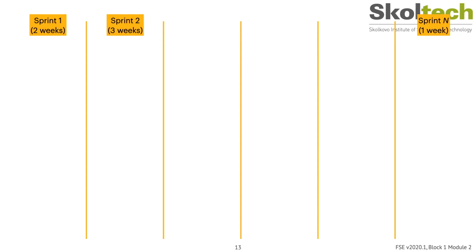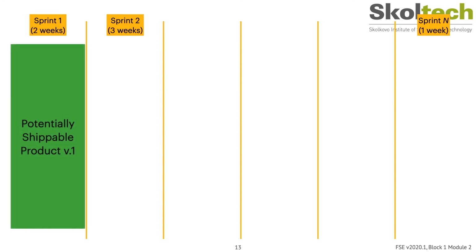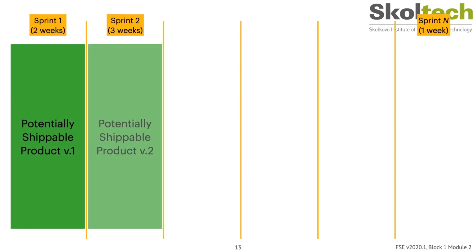strategy. A Scrum project creates a series of time-boxed incremental iterations, which are usually called sprints. In traditional Scrum, a sprint is 30 days long, although some people prefer shorter sprints of 1, 2, or 3 weeks. The goal of each sprint is to deliver a version of the software that may have limited functionality but still be usable in some way, often called the potentially shippable product.